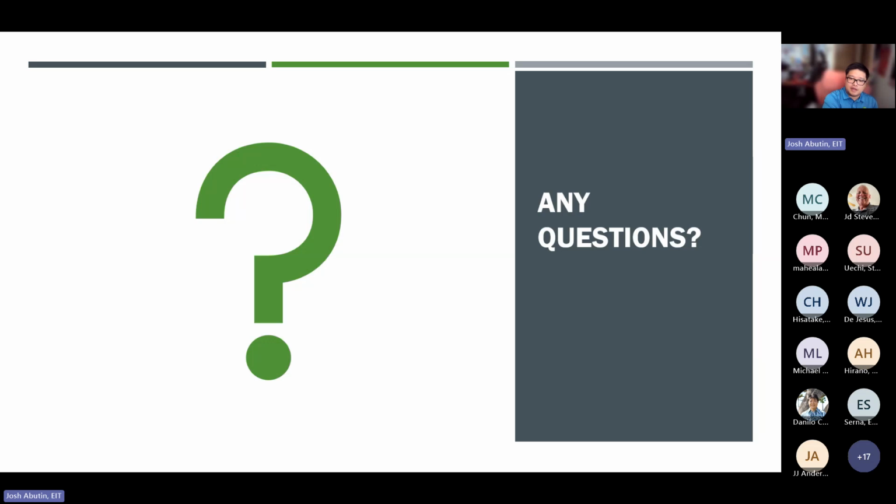Work with Highway D when updating the specification and discuss this. And another comment from Joel, this helps you ensure you're tracking all your required submittals for your project. Just want to emphasize that's one of the main uses for this master submittal log: for you to make sure you don't miss any critical submittals, and keep track of your submittal checklist, especially for closeout, making sure everything is there.